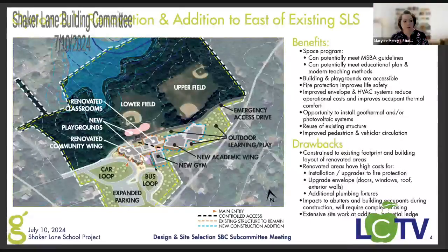Yeah, so we would keep the existing academic wing up while the new academic wing is being built. And then once it's built, they get shifted into there, demolish the existing academic wing and install the gym. So the students actually have a pretty easy move. It's going to be more the shuffling around of the other spaces that are a little bit more challenging. But in terms of their classroom and day-to-day activities, that's pretty minimally impacted.